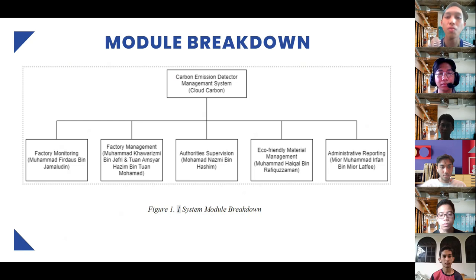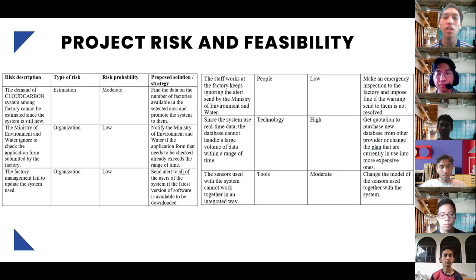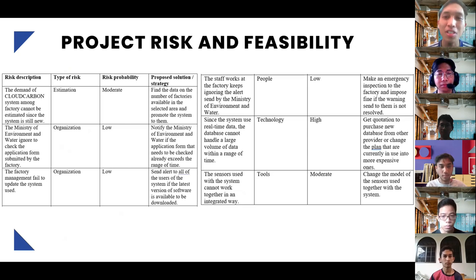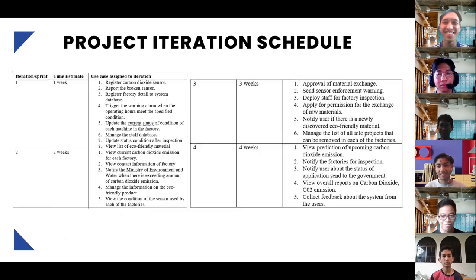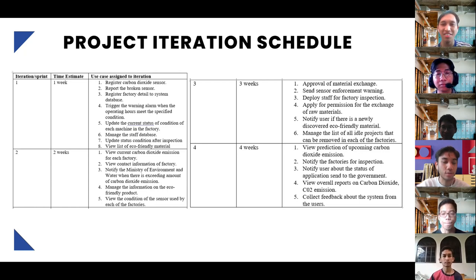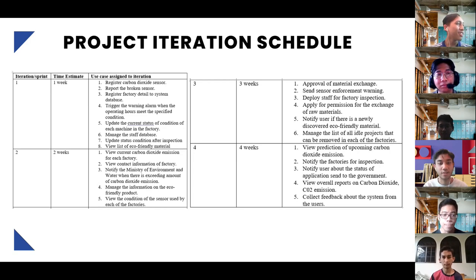We break down our system into five modules: factory monitoring, factory management, authorities supervision, eco-friendly material management, and administrative reporting. For the project iteration schedule, in the first week we have eight use cases, the second week five use cases, the third week six use cases, and the fourth week five use cases.